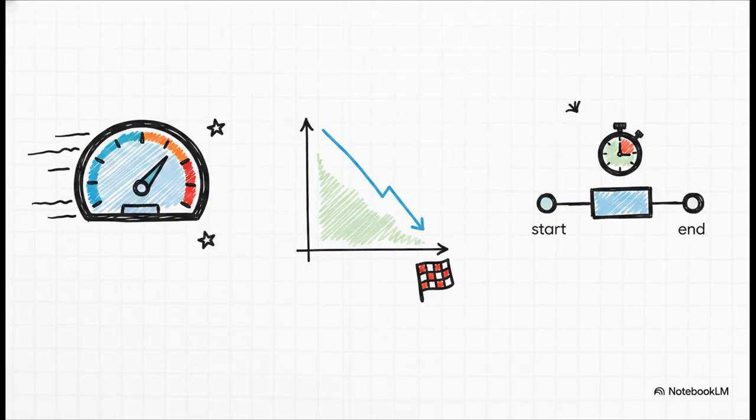And those story points feed directly into our broader metrics. We use something called velocity to track how much work your team successfully completes over time, which gives you a great baseline for future sprints. Meanwhile, you'll utilize sprint burndown charts to visually measure if your current sprint is actually on track for success. It's literally a chart burning down to 0. And finally, cycle time tells you exactly how long individual tasks take from start to finish, which is perfect for spotting any frustrating bottlenecks in your workflow.